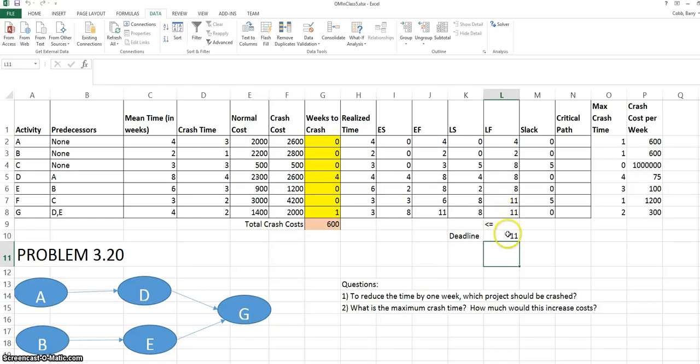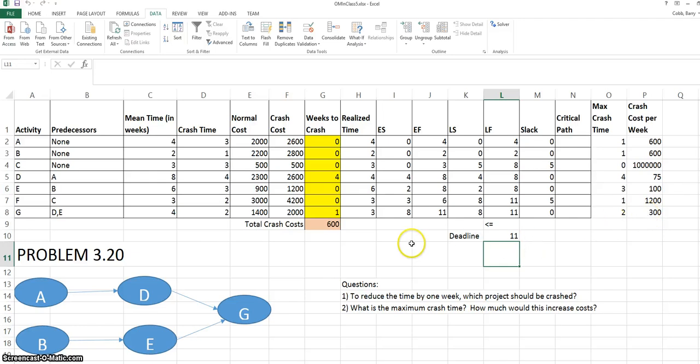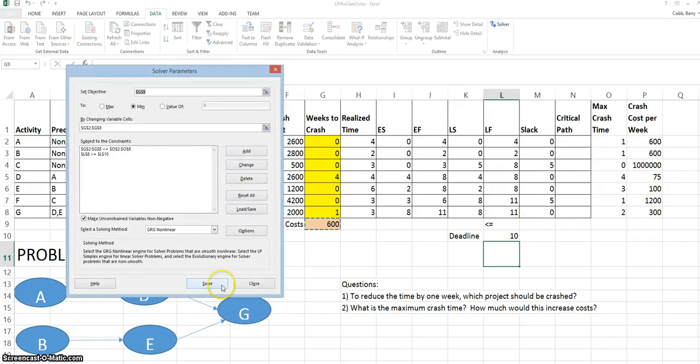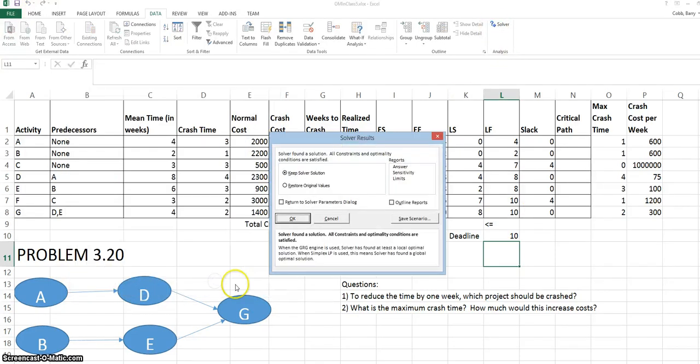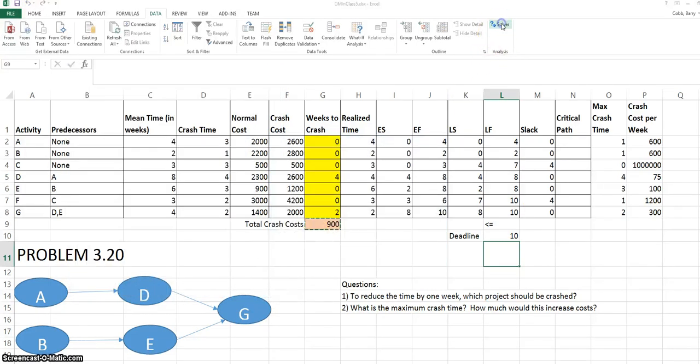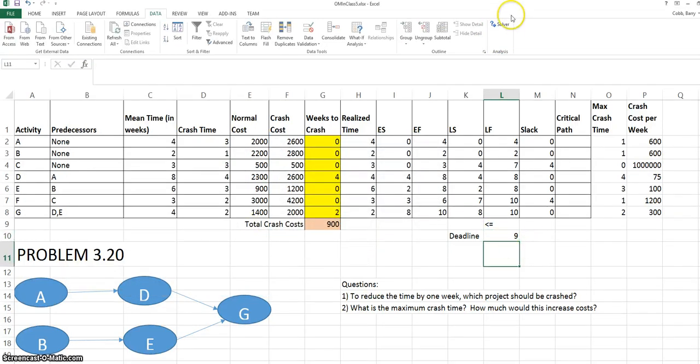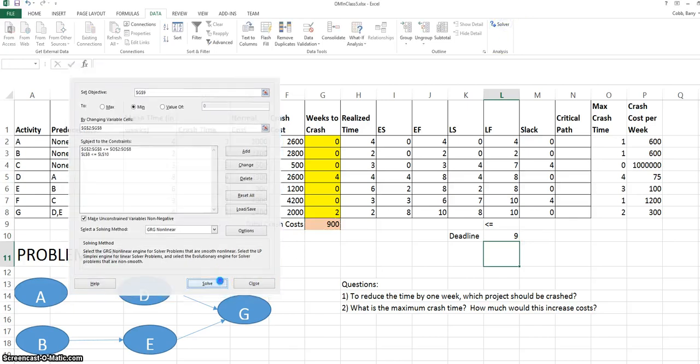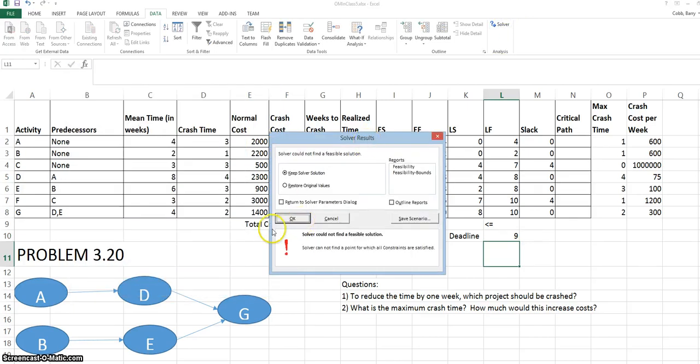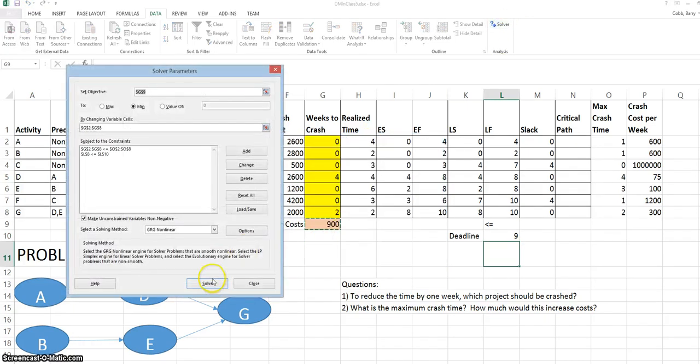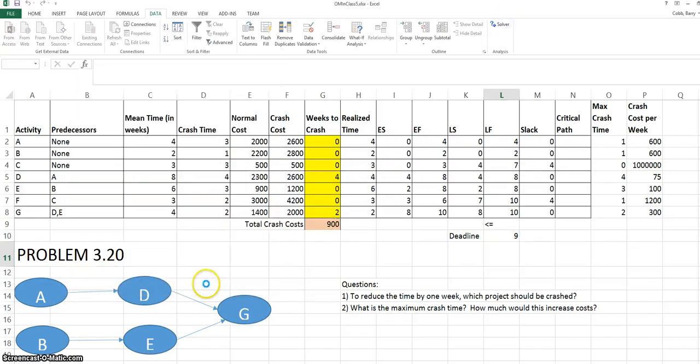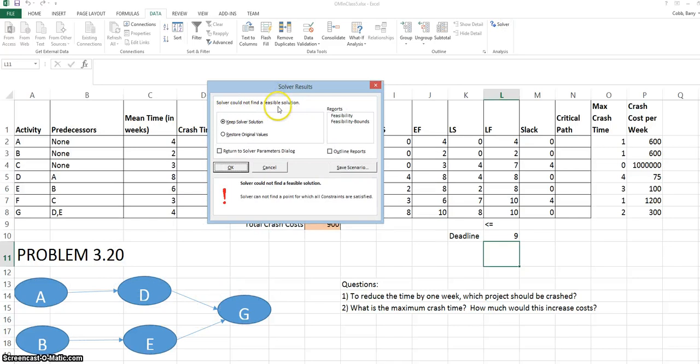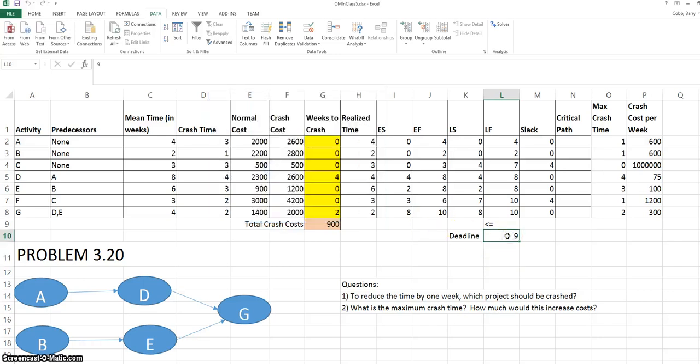I've gotten to a point where I've solved down to a deadline of 11 days and have a crash time solution. Notice that the solution is now to crash the activity that costs $300 to crash, most likely because it's part of the critical path, while there are still cheaper activities. So I'm going to try 10 days as a deadline. And I still get a solution at 10. Once I go to nine as a deadline and solve three to four times, I keep getting a window that says Solver could not find a feasible solution. This means to me that we can't complete this project in a deadline of nine weeks. So we can put 10 back in and it looks like we've found our solution.